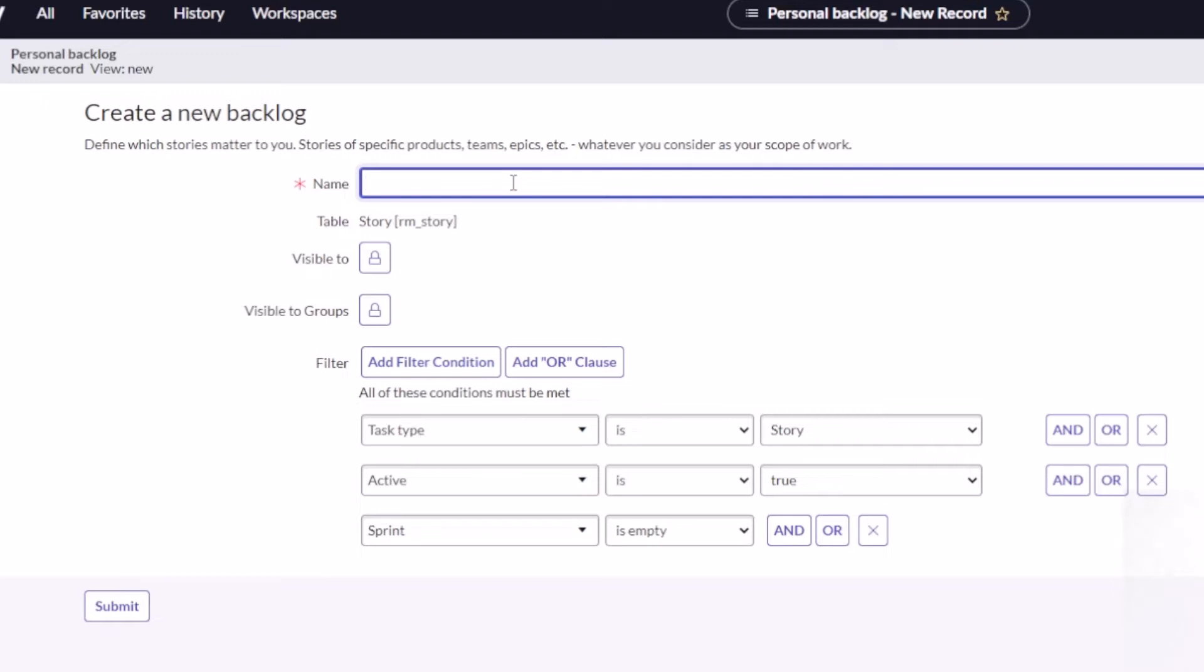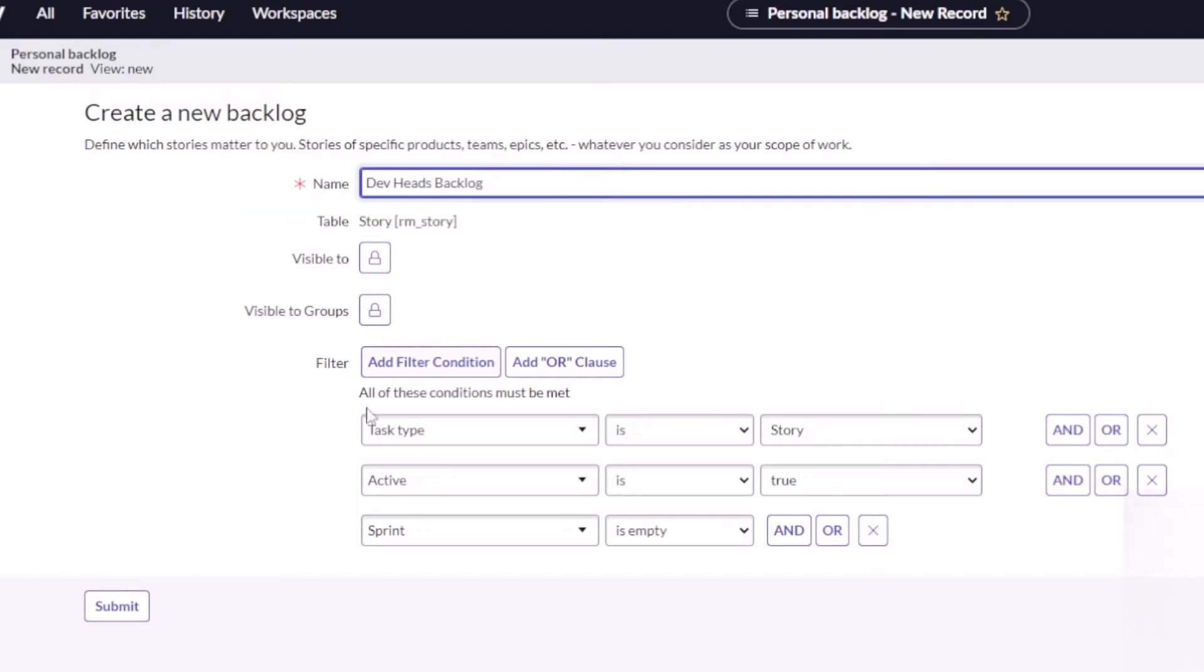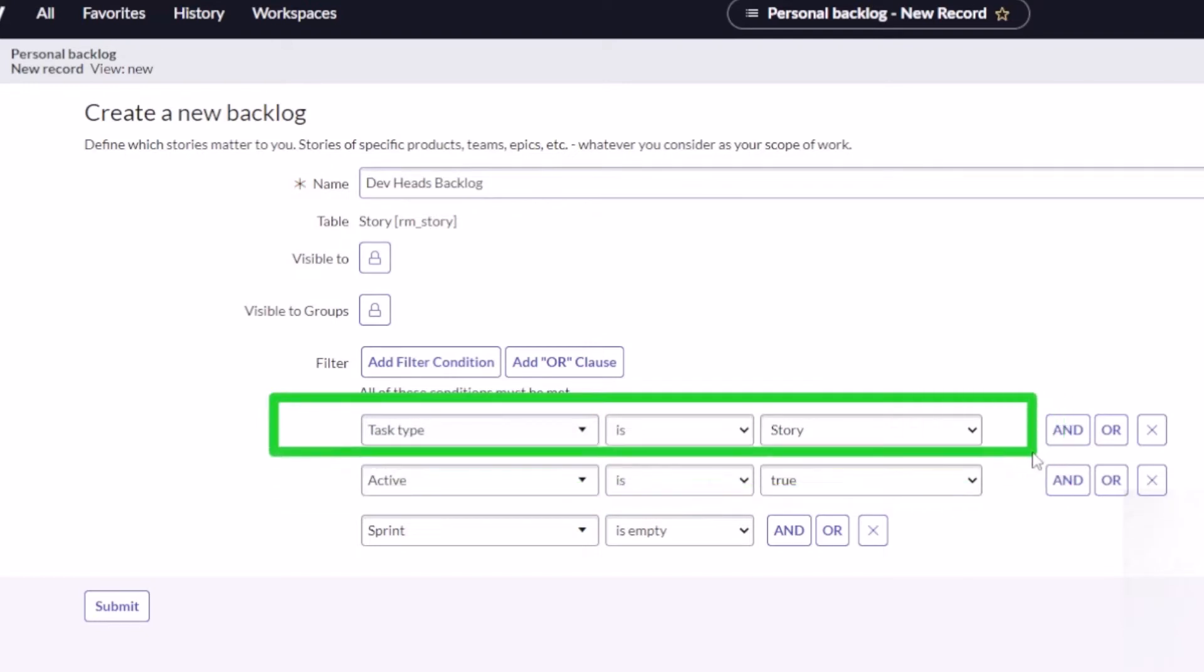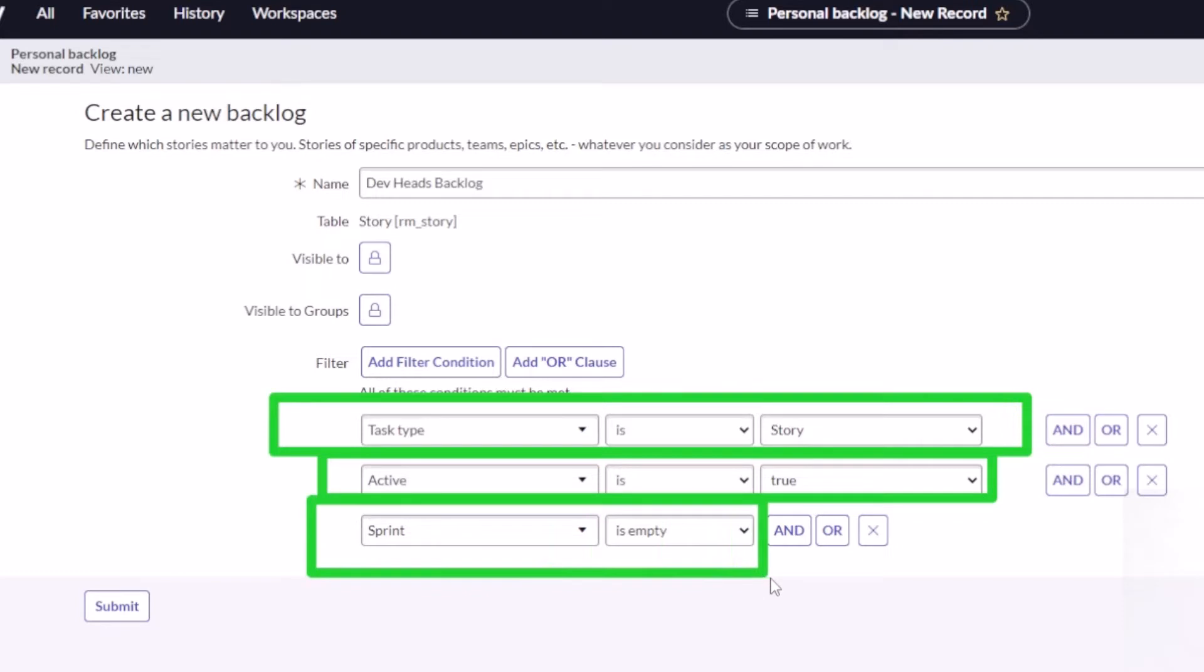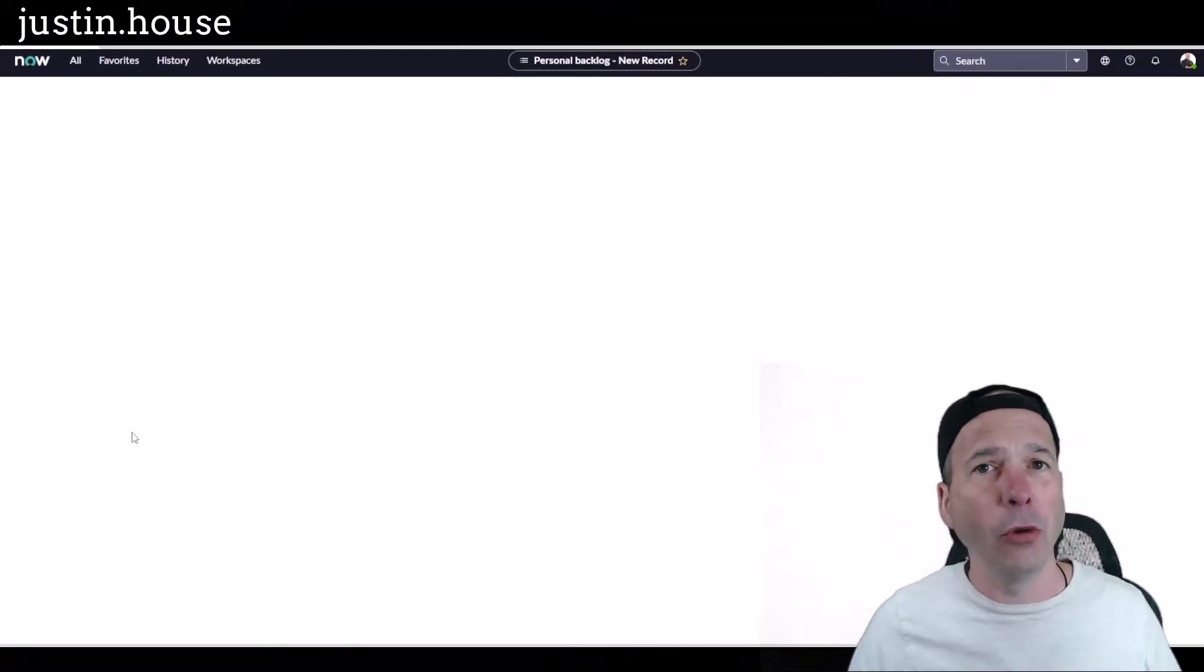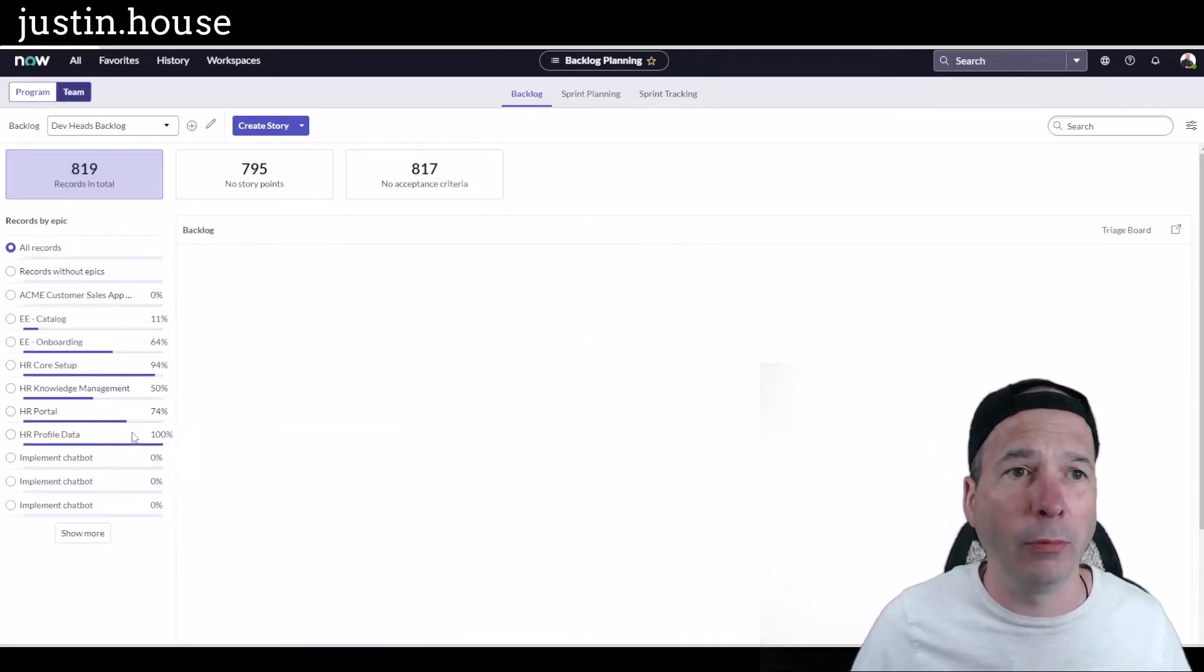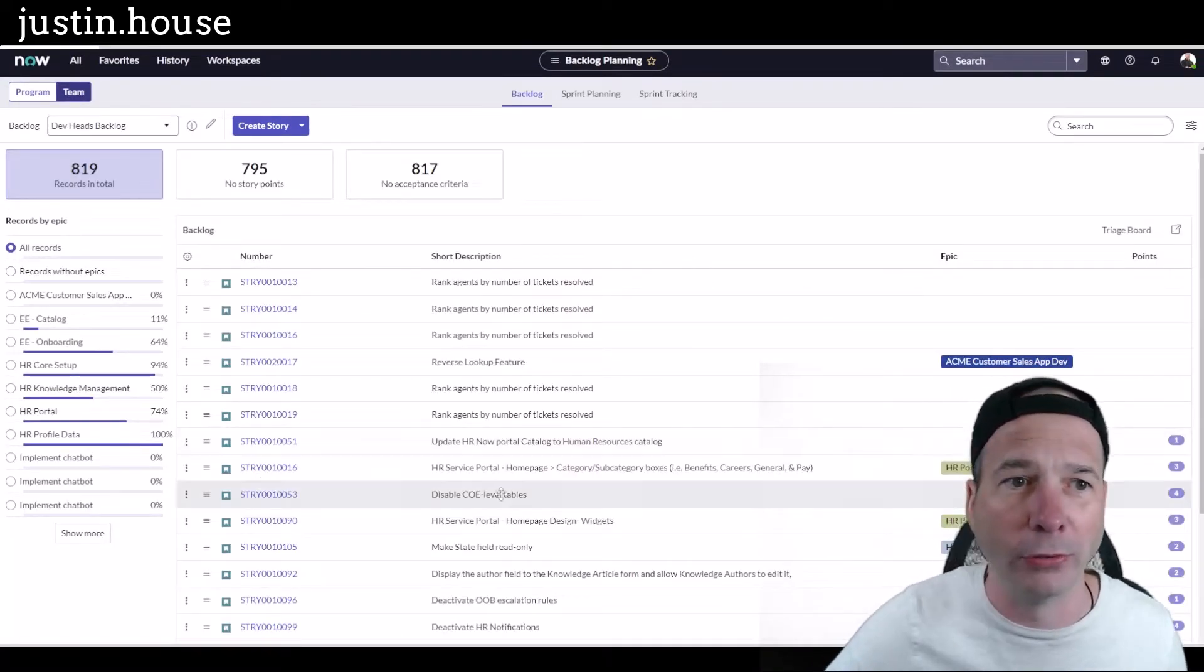If you're not familiar with story grooming, we're gonna assign them to teams, add some points, put in some acceptance criteria, stuff like that. Let's give our backlog a name. I'm gonna call this one the Dev Heads backlog. I'm looking for a task type that is a story, so it's gonna find any stories that are active and not part of a sprint. That's gonna show me in my demo system 819 stories.